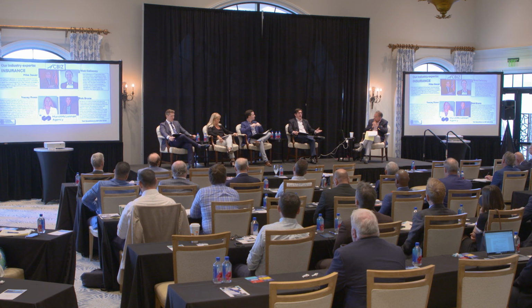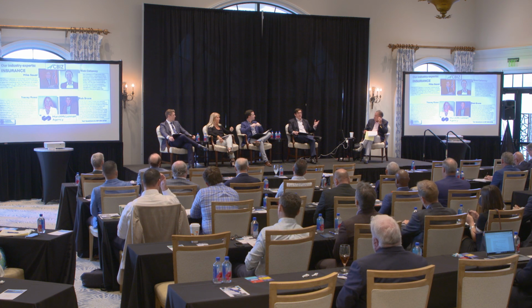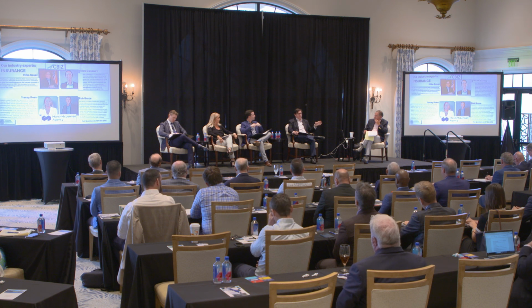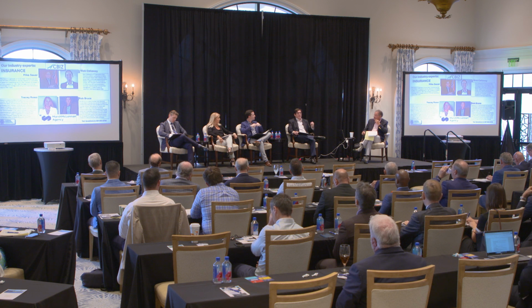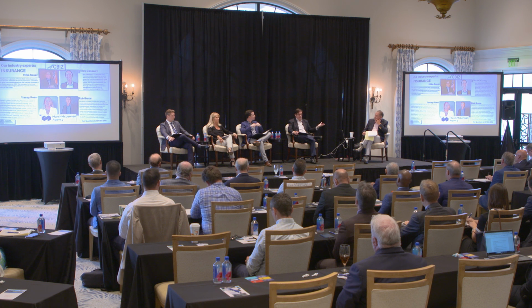One thing that I know a lot of the builder's risk policies don't cover fully is your landscaping. So you might have, say, a $3 million builder's risk project, and 50% or $500,000 of that might be just trees and landscaping. But your builder's risk policy may have a sublimit or may exclude it completely. So stuff like that, we see that exclusion quite a bit, especially in Florida where we get wind and the wind blows trees over and landscaping around. So that's one thing to consider.